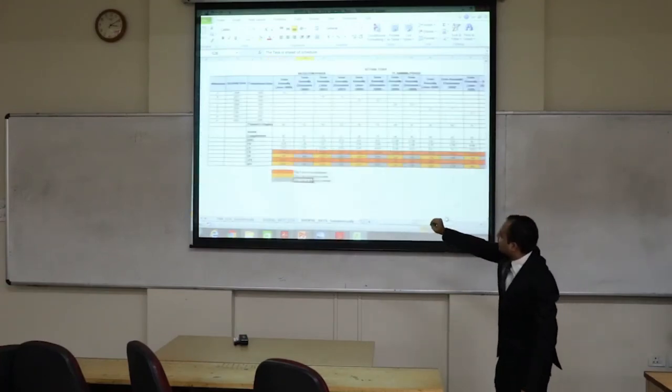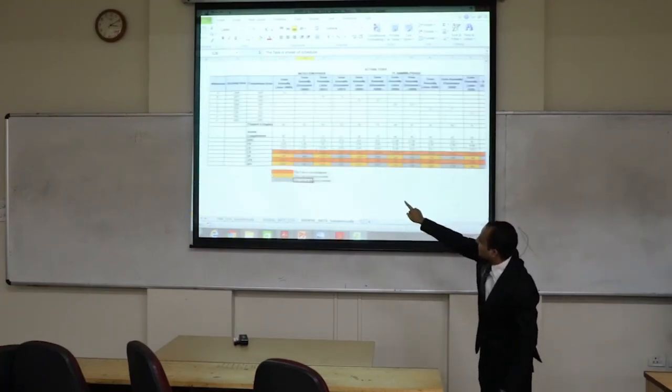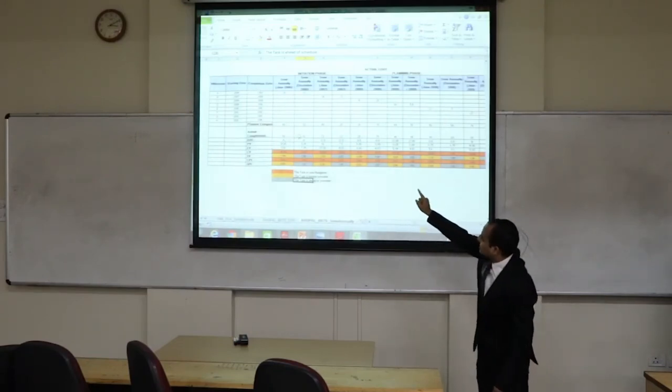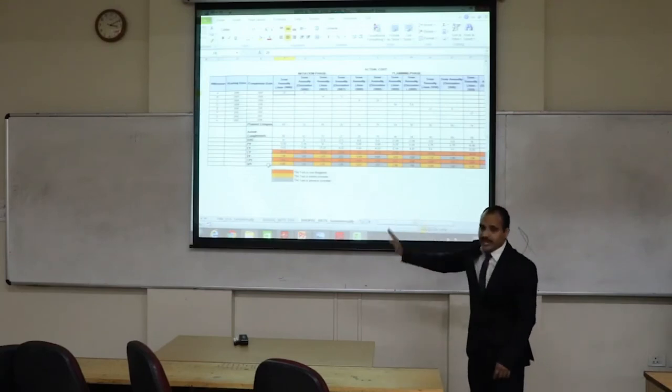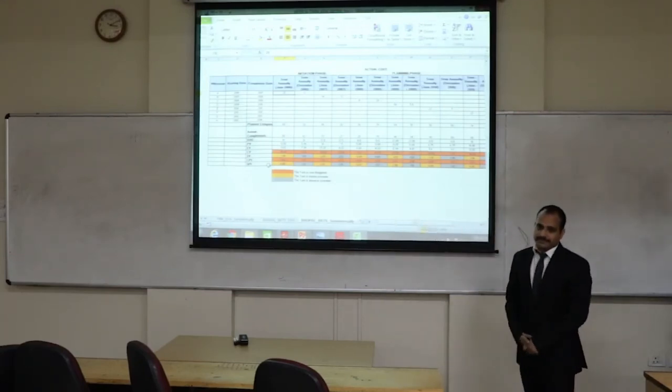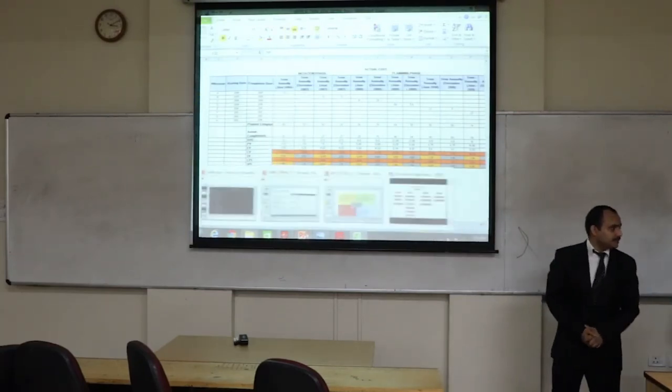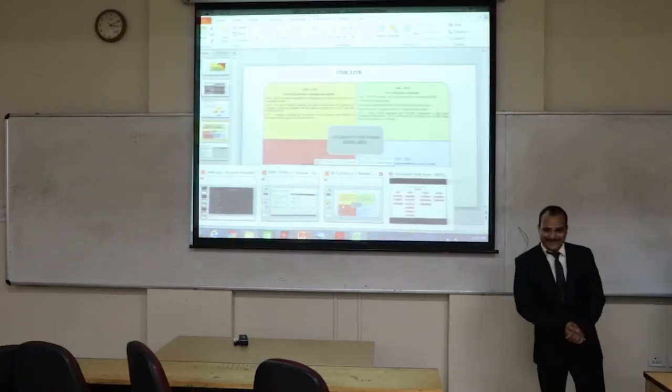For example, the activity A first phase is over budgeted, whereas same activity under schedule variance is coming negative. So it is also behind the schedule. I will just call Rahul for explaining BCP.